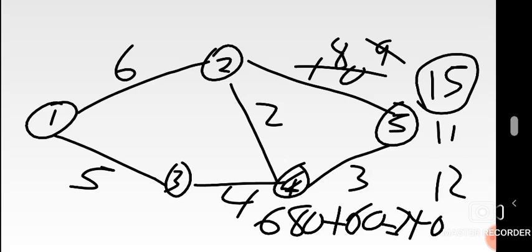That's what we are now. Determine the critical path once again. So okay, 1 to 2, 2 to 4. So 1 to 2, 2 to 5 is 14. Okay, you have 14. I'll write the figures on the left side of the screen. 1 to 2, 2 to 4, 4 to 5 gives you the same figure, 11. 1 to 3, 3 to 4, 4 to 5 gives you 12. Longest route apparently is the same one. So you determine the critical path, the longest one, 1 to 2, 2 to 5 apparently.